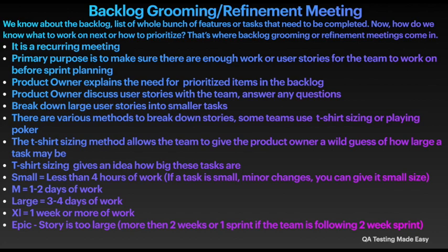Small size, usually less than 4 hours of work. Medium size, 1 to 2 days of work. Large size, 3 to 4 days of work. Extra large, 1 week or more. T-shirt sizing can vary from one team to another or from one company to another.